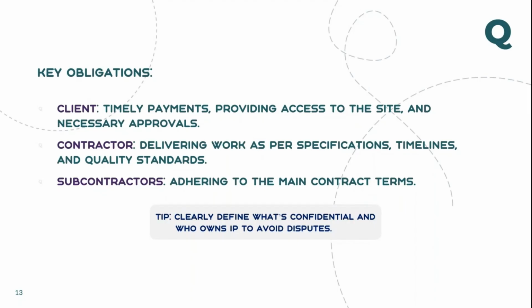So first, when you look into client obligations, you identify them against your risk and the remedy for that. Secondly, when you look into the contractor's obligations, you have to ensure that whatever they have typed in the contract as your obligation is the same as the scope your estimation department received. If not, you have to highlight those points and send them back to the employer: dear employer, we haven't priced for this item.